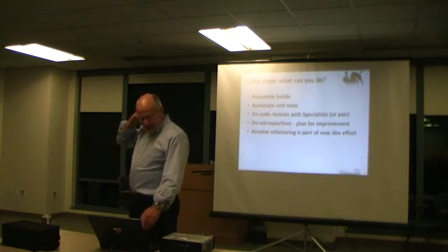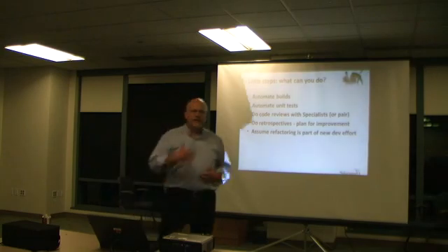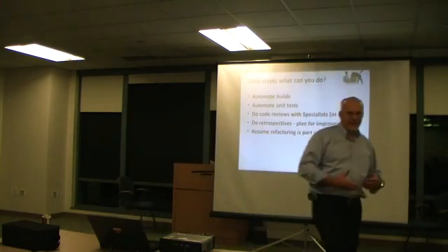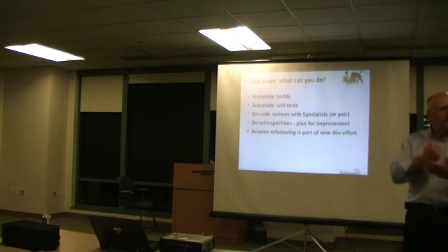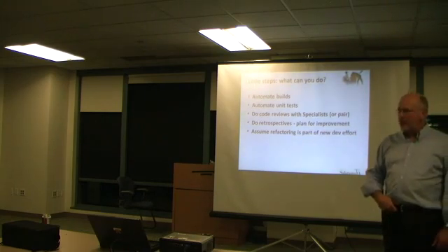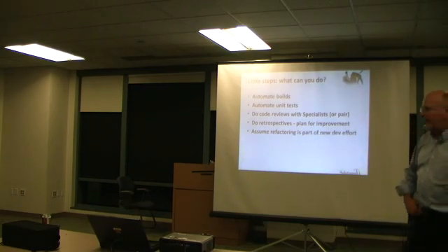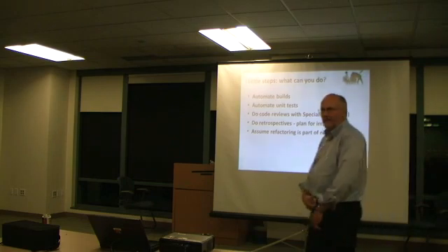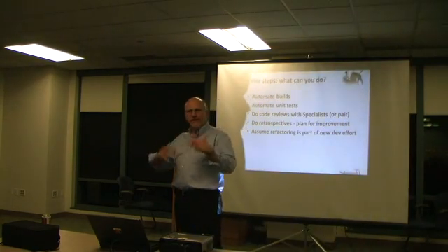Yes. Assume refactoring. This is another one that I don't know if you guys get. You're doing development and you say, well, I've got this crufty code. Can I do anything with it? I don't get time. And people are demanding that I do new features. Well, part of your estimate, it's going to be 6 months and $1 million. And part of your 6 months and $1 million is do some refactoring. Assume that you're going to do some refactoring of code, and make it kind of non-optional. Otherwise, your software is going to rust and get moldy.